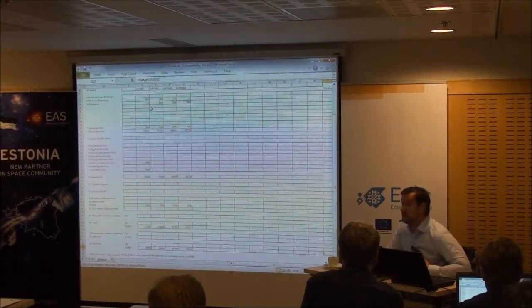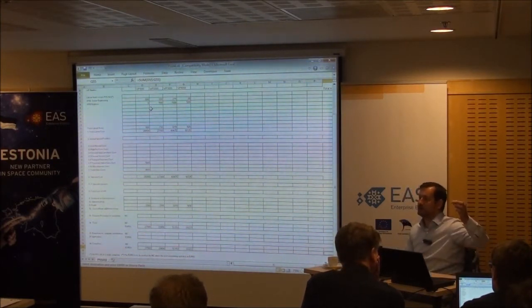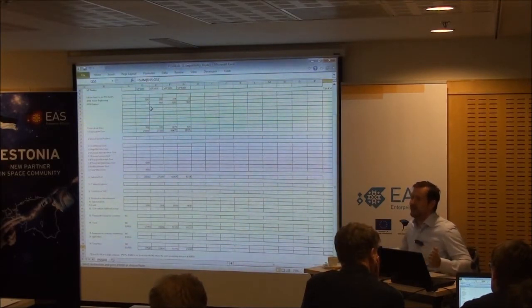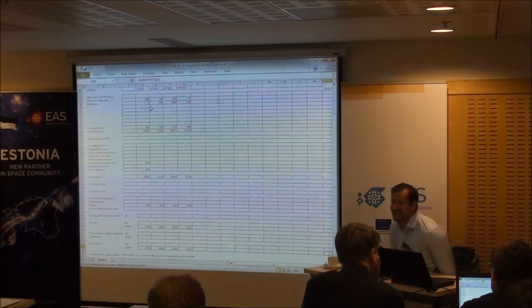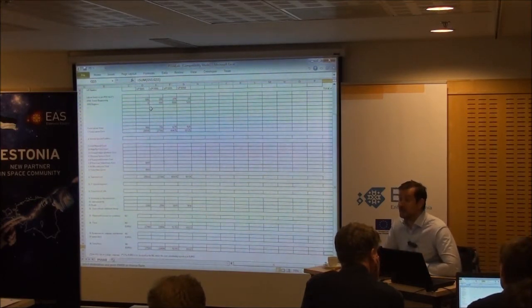Is there confidence in your numbers? Because clearly if you don't put in figures they think can work, they're unlikely to give you the contract, because they'll expect it to fail. So that's why they do that. It's not a get-out, oh sorry, I've now spent 3,000 hours so I should stop. If you're signing a firm fixed price contract and those are the number of hours you've determined the job to be, and you get it wrong, it's your problem.